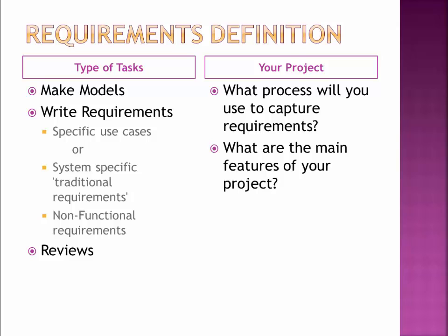Based off of that, we're going to do the requirements, which might mean making some models, an analysis model, whether structured or object-oriented. It's going to be prepping this information to write the requirements. Again, we need to figure out the methodology. Are you doing use cases? In which case, I want to know what use cases. There's a login use case, there's a buy stuff use case, there's a sell stuff use case, there's a file a claim use case, there's a trade a player use case. These are the standard examples I've used throughout. But that's what we would expect to see at the work breakdown structure, not just write use case.